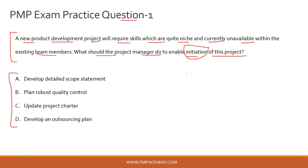Let's look at the options one by one. Option A: develop a detailed scope statement. Does the scope statement happen in the initiation stage or in the planning stage? It happens in the planning stage, so this is outrightly incorrect. Option B: plan robust quality control. Quality control happens in the execution stage, not in the initiation stage — hence this is also an incorrect option.